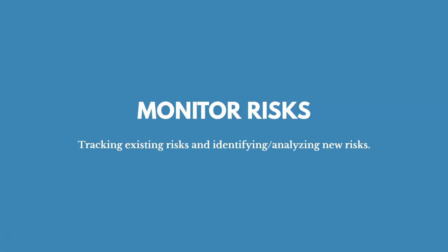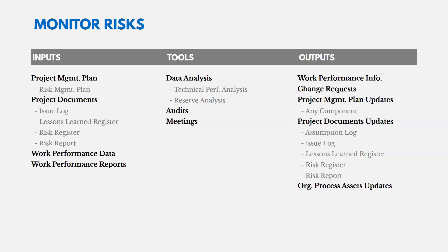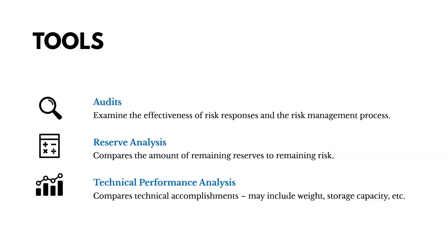Finally, let's talk about monitoring risks — tracking existing risks and identifying and analyzing new ones. Like all monitoring and controlling processes, inputs include the project management plan and work performance data (plan versus actual), with work performance information and change requests as outputs. Tools include technical performance analysis, reserve analysis, and audits. Audits examine the effectiveness of risk responses and the overall risk management process — looking at not only individual risks but how we're doing overall.